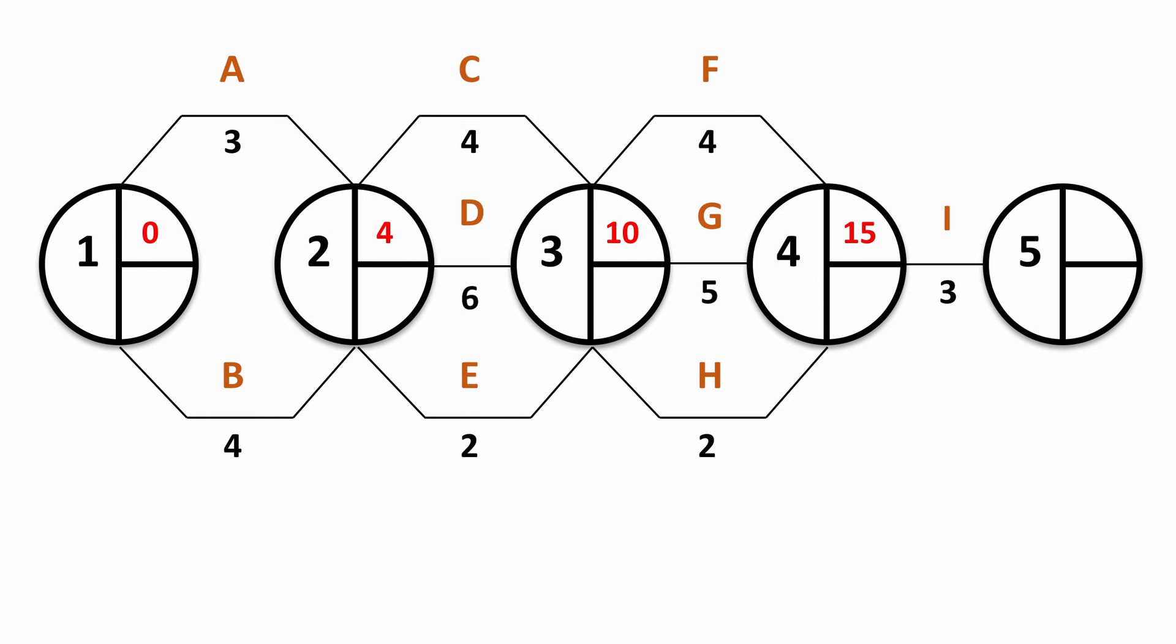This diagram is relatively straightforward. When you work at the latest finishing time you work backwards, always taking the lowest calculated figure. Now sometimes these diagrams are more complicated than this, it will work out to be actually the same as the earliest start time, as you work your way back through that data. So there we go, that's the completed original diagram for the network, with the assumptions about the nine activities and their durations.